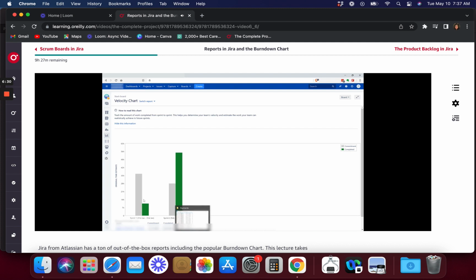But just real quickly, because this is a project that is just starting up, it is a great example to show you something that typically happens with Agile teams when they're just starting to work together on their projects. It is very, very common to see Agile teams that are just starting up to overcommit and plan to do way more than what they can actually do in a single sprint. And that's what happened to us in sprint one.